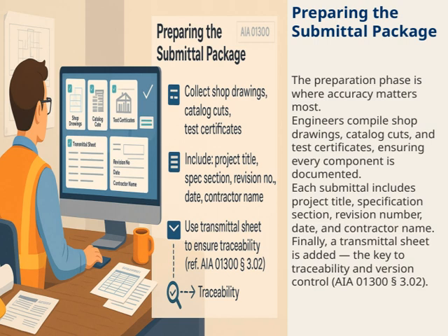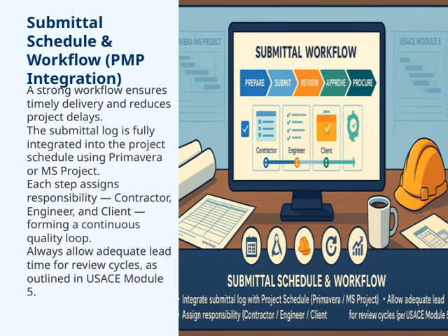A strong workflow is essential for ensuring that project deliverables are completed on time and that we minimize delays throughout the project. When we have a well-organized process, it helps keep everyone on the same page and reduces the risk of missing critical deadlines. The submittal log plays a crucial role here. It's fully integrated into the project schedule, whether we're using Primavera or MS Project. This integration allows us to track submissions seamlessly and see how each step fits into the overall timeline.